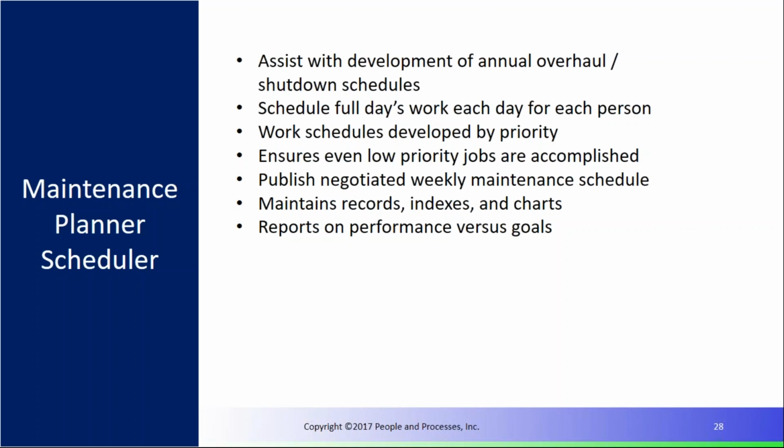And everything needs to be developed based on priority. I talked earlier, in the priority matrix, about having 3 levels of plan work. So what you would do, for example, is have 60% of your available resources dedicated to the highest priority plan work, and maybe 25% to the next level priority plan work. And then at the bottom, 15% of the available resources dedicated to the third level of priority plan work. The reason is, this might be something that you assign to the reactive technicians if you've broken up your crew. This is work that they can break away from and come back to.